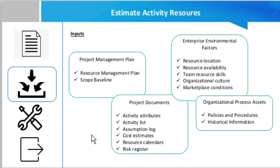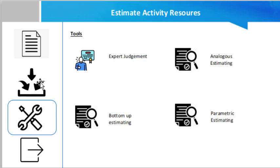A resource calendar identifies the working days, shift start and end of normal business hours, weekends, and public holidays when each specific resource is available. The risk register describes the individual risks that can impact resource selection and availability. The other inputs are enterprise environmental factors and organizational process assets.